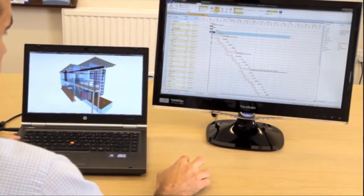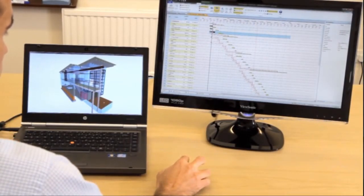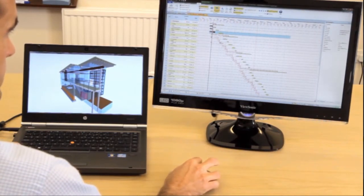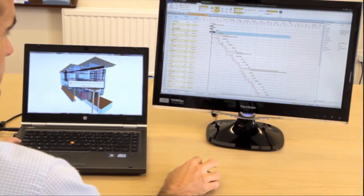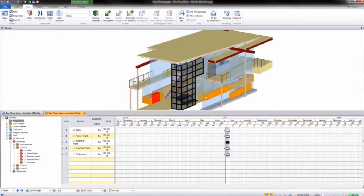Aster Power Project BIM is a bolt-on module for Aster Power Project, which brings 4D planning within affordable reach by combining 3D models with scheduling tools. It enables you to add a 3D model view alongside the project activities on the Gantt chart in a single application.